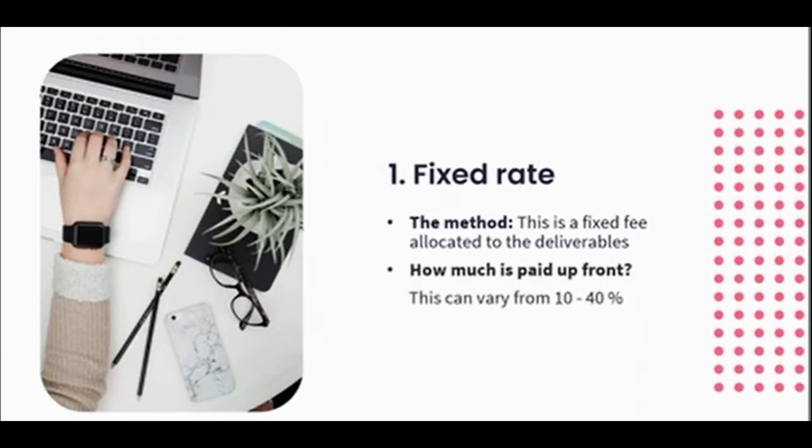Then we need to look at how much is paid up front. So this is like a deposit type scenario, the percentage or the rate that you're going to take as a deposit. It can vary from about 10 to 40%, but I definitely suggest ensuring that you go no lower than 30 to 40% just to cover yourself, especially when you're starting out. You can absolutely use your initiative here, but keep it higher than lower.